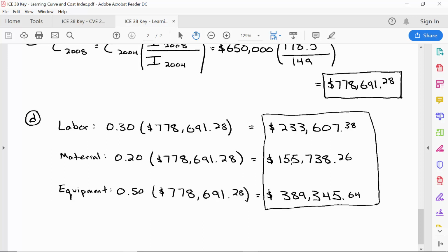So you might know, for instance, that steel costs 30% more in Alaska than it does in California. But then maybe labor is less expensive in Alaska compared to the building that you had constructed in California. And so you can account for changes in prices by region, changes in prices by time, and so it's a really important approach.